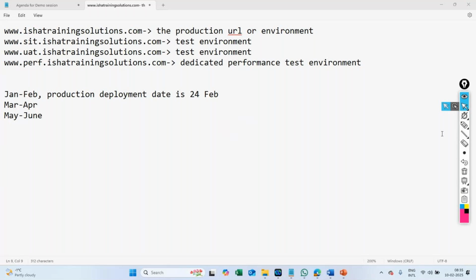In between this time, we are finding the issues and telling the developer, then they will also take time, right? That's the reason we have to complete the performance testing at least 10 to 14 days before. If they have some issues and can fix them in 1-2 days, they will fix them here itself. Then you run one more test in this timeline, just for confirmation.